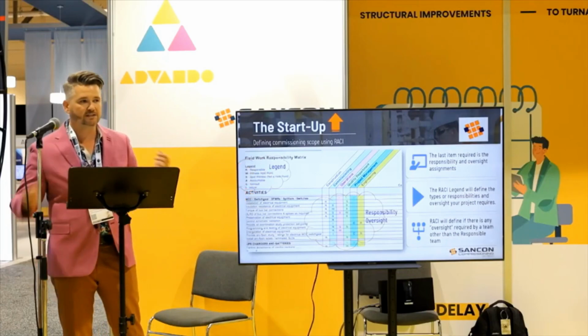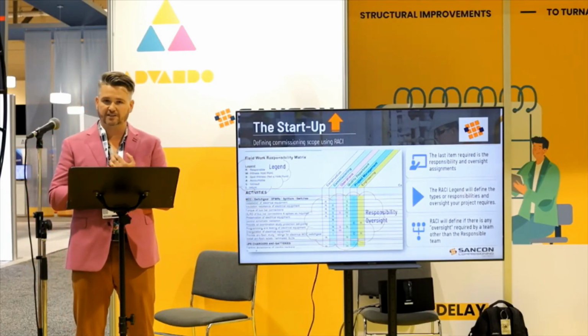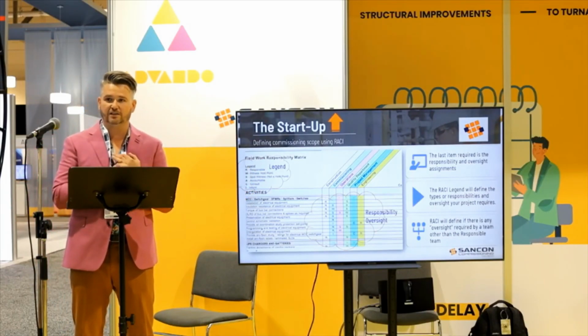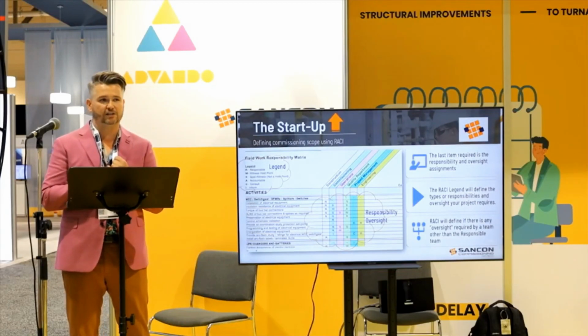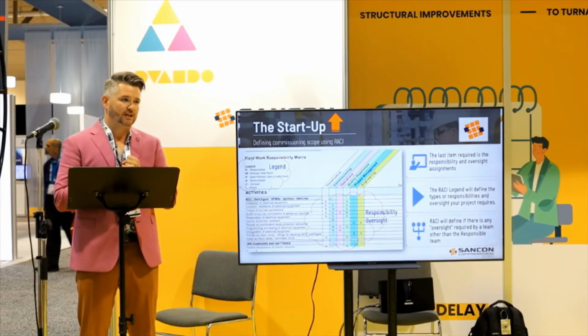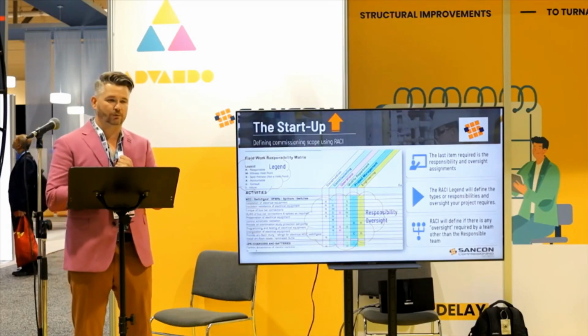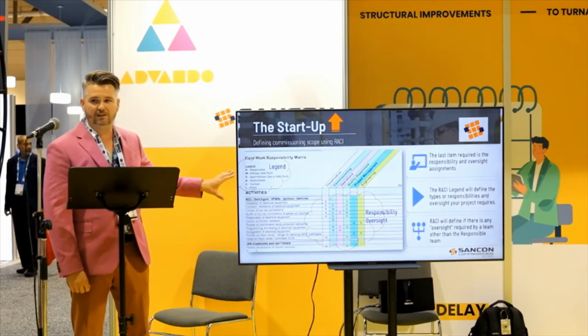across the map. And this is a team exercise that gets done at the start of the project, during the planning phase of the project. This isn't something we want to execute 60% through construction completion. This is a pre-FEED document that should be done pre-IFC.